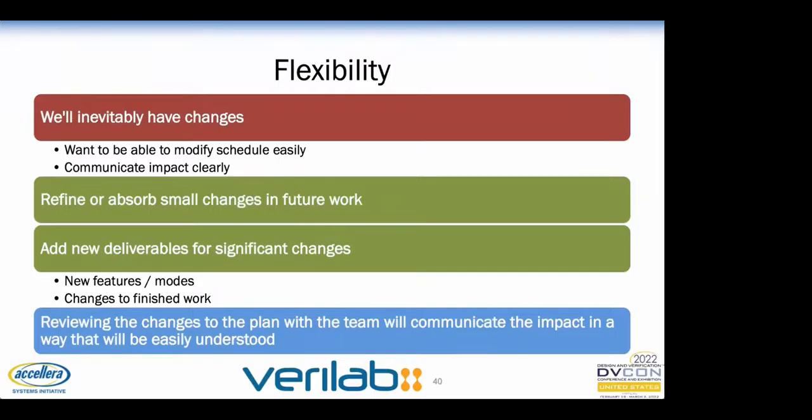By packaging the impact to the effort and schedule directly stemming from the change, we can communicate this impact with the project manager in a way that's easily understood. We've had cases where the team decided to remove a change that had already been made to the RTL because of the impact to the verification team's schedule.